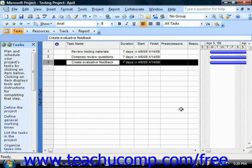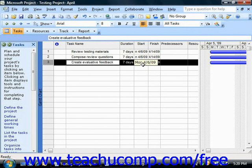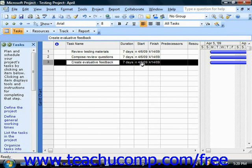Since Microsoft Project is a task scheduling application, note that you will most often set the duration of a task and not the specific start date. When you set a specific start date, Microsoft Project will interpret that as a constraint on when that task can begin and will never schedule it ahead of the specified start date, even if it was possible.